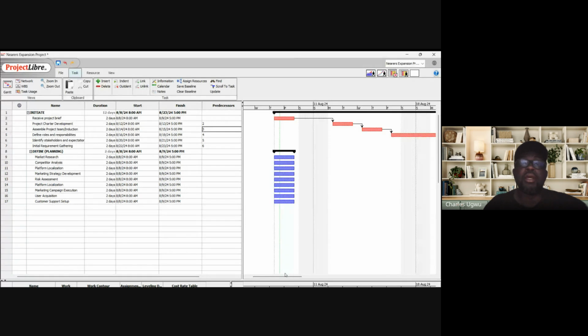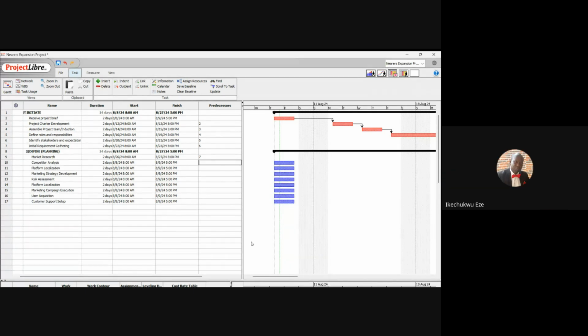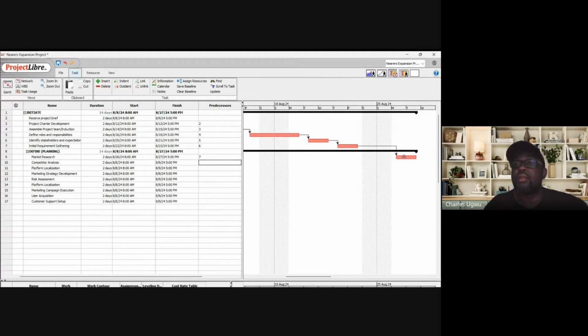To continue here, to start this one, this particular market research, which is number 9, we need to finish number 7. So here we'll come and say number 7, and you see it here, that's connected, and then this is number 9. We'll put number 9 here.